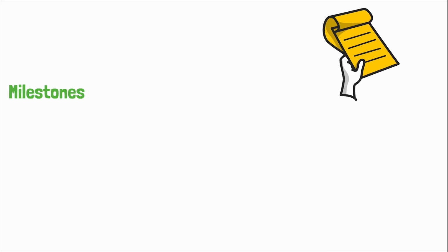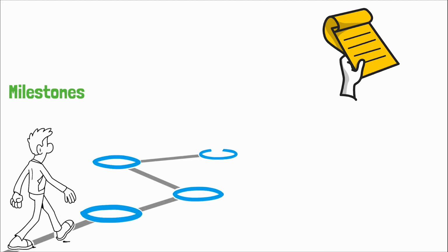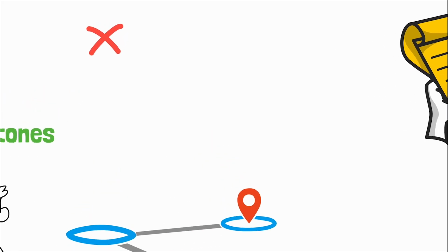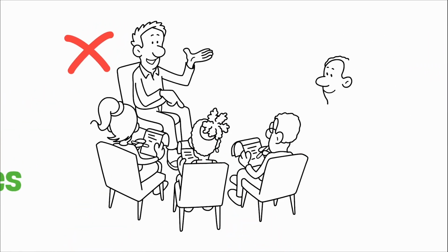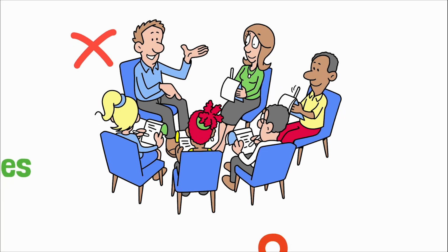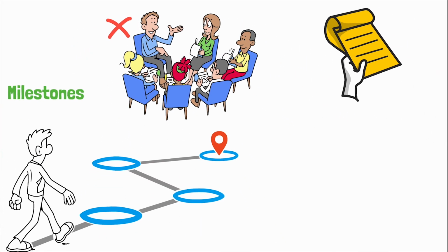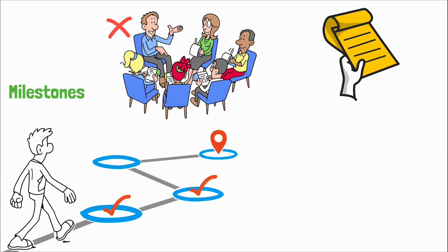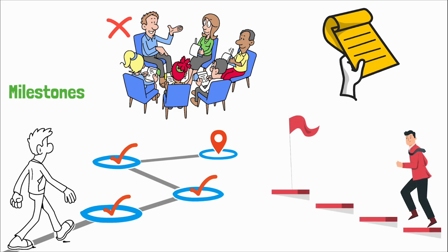Now, considering the objectives, let's weave in the answers to some key questions about project scheduling. Milestones, for instance, are pivotal, serving as checkpoints. They are not just about signing the project charter or the completion of the WBS, nor are they as frequent as weekly team meetings. Rather, milestones are typically identified for significant events such as the completion of a major deliverable, providing clear targets and points of reflection for the team.